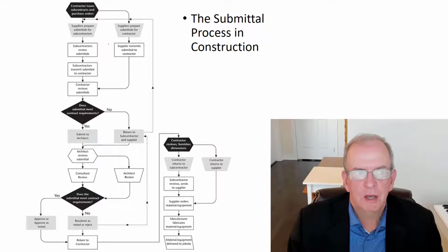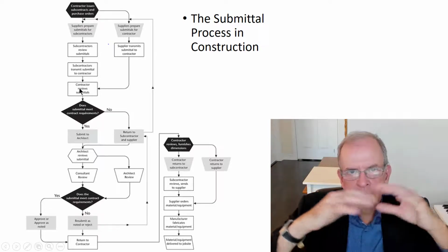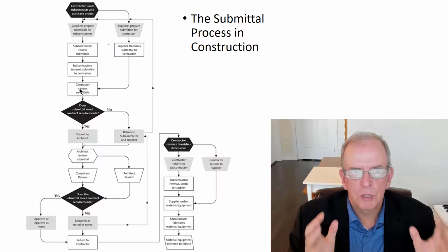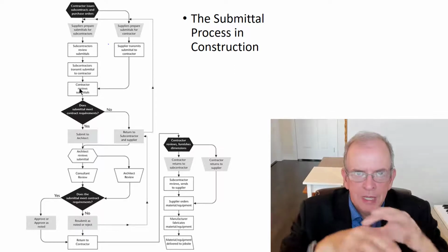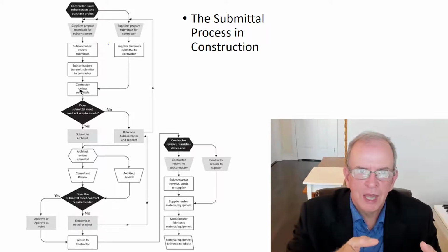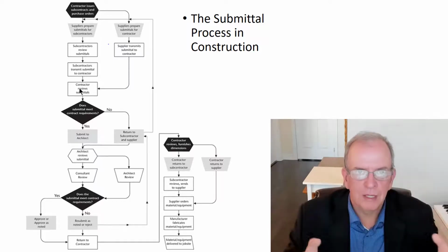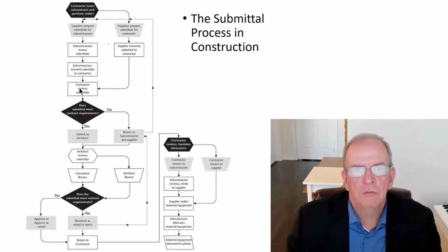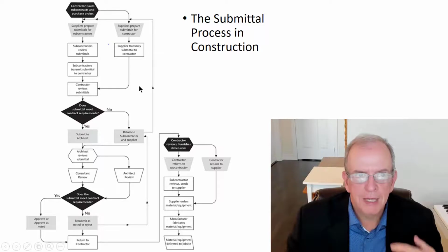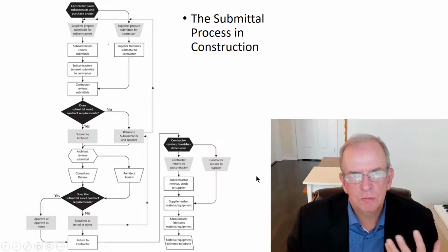That's where productivity software like Bluebeam, Procore, FieldWire, just to name a few, help to streamline this, because they'll have systems in the productivity software where you submit directly through to the supplier, it comes back, and it's in the internal documentation. The consultant can access it from there. You can access it from there, and you can see comments immediately, which means it's in one place and everybody is reviewing it. That can really streamline and make the steps much quicker.